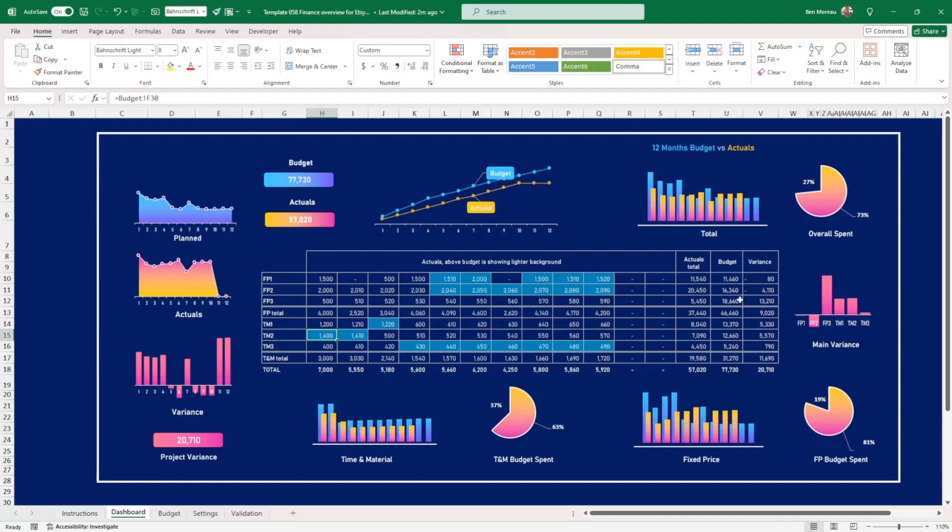And here, no surprise, you put the total actuals, the budget and the variance, which is the difference between the budget and the actuals. And you have two months available here that will fill up as we progress.